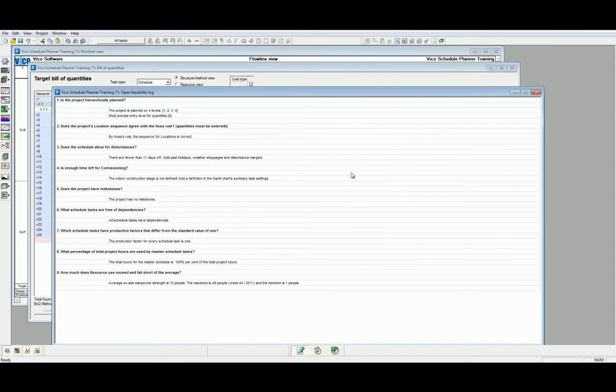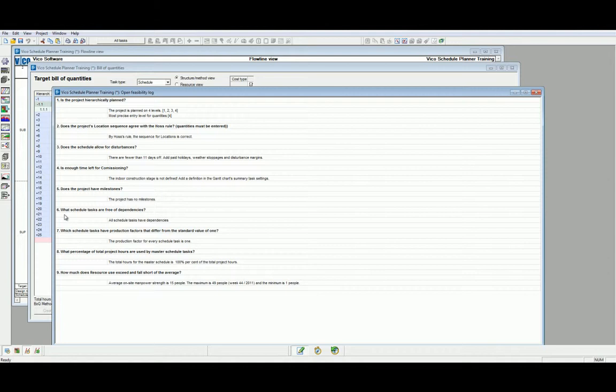The Feasibility Log gives us an overview of our achievability of the schedule. Some key indicators here include the sixth question, what schedule tasks are for your dependencies? This gives us an inclination if we have completed our entire schedule with correct logic. We can also access some more interesting information, including point nine, which is how much does resource use exceed or fall short of the average?